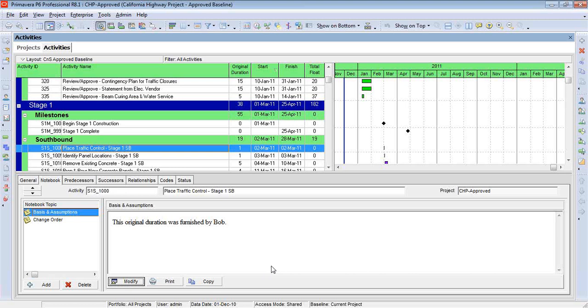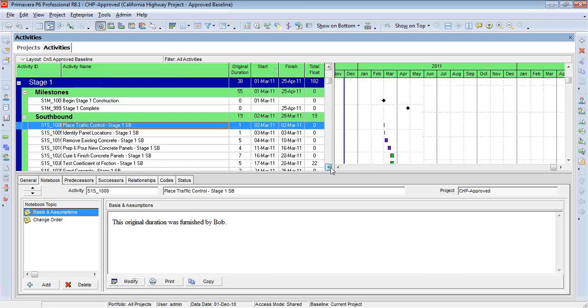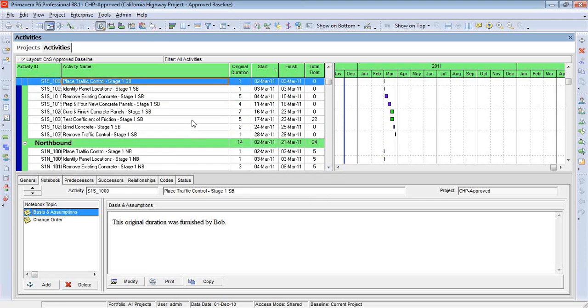Or I might have a situation, and I think we have a few of them in a schedule, where we have a particular amount of time that has to be required for testing, and it's in the specifications.